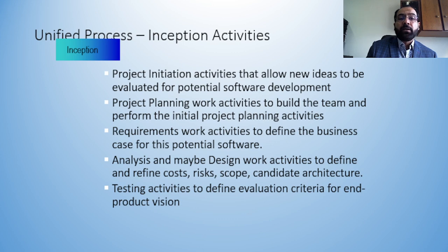And also you can see in the last, testing activities. So this is important because initially whenever we go with these models, we have one concept that testing should be done at the end. No, testing is not done at the end, because testing is a continuous process. So whenever you start developing your system, you start initializing your system, or you are developing the scope, even in that phase you can identify what will be the testing activities which need to be followed.